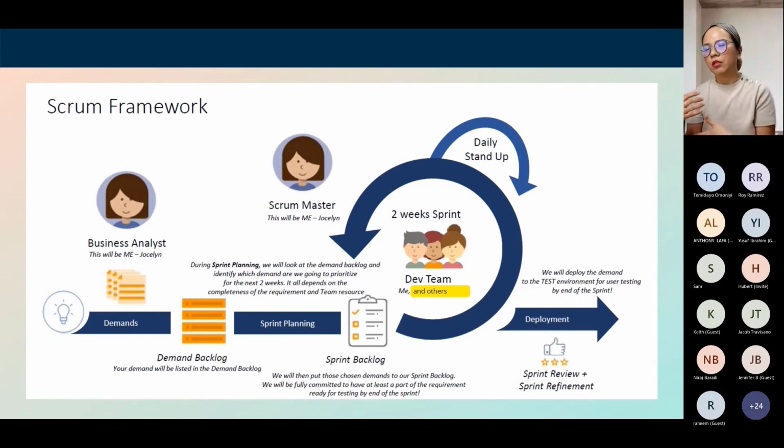So we decide how complex it's going to be. Not sprint planning, sorry, sprint refinement. During the refinement part, we discuss how complex the report is going to be, and we assess whether we are going to split it, or do it in one go, or take another 2 weeks just to do part two. This is just a sample of something that might work for you as well.